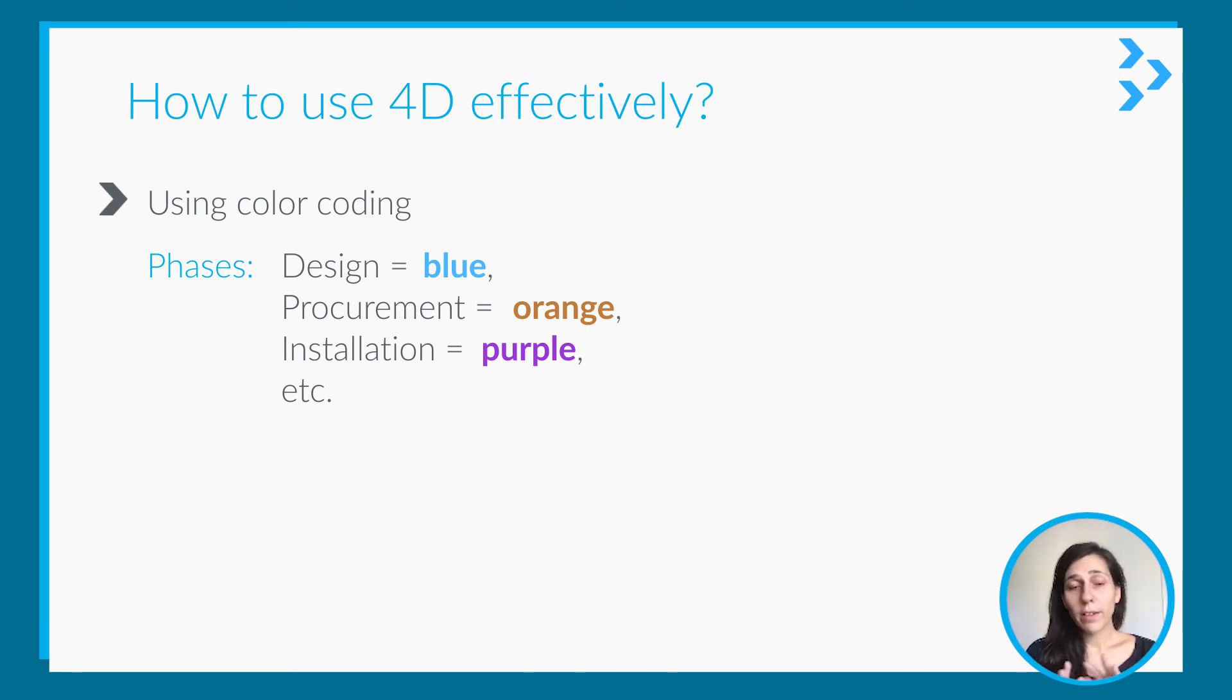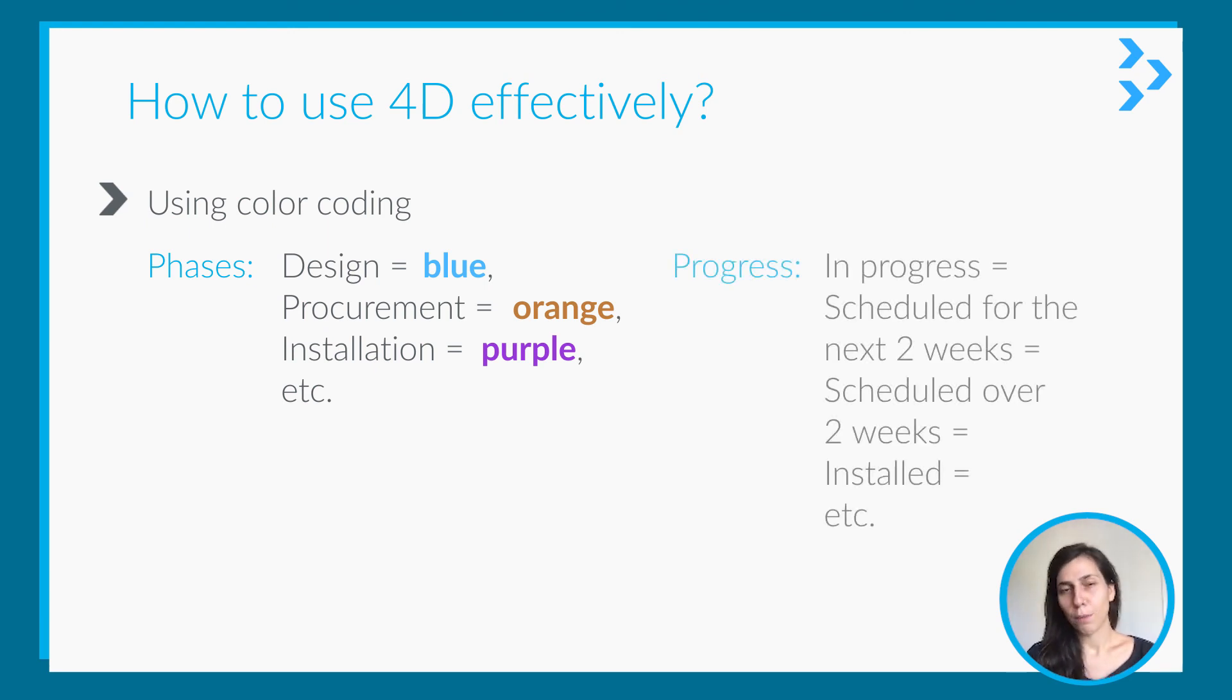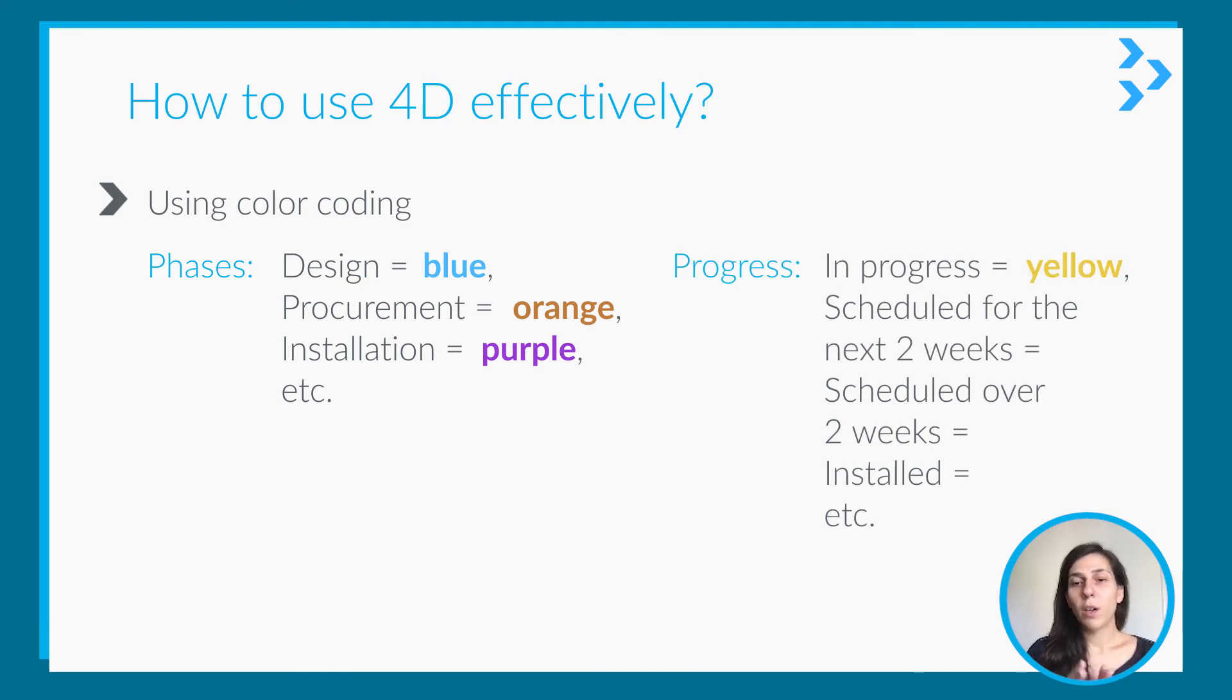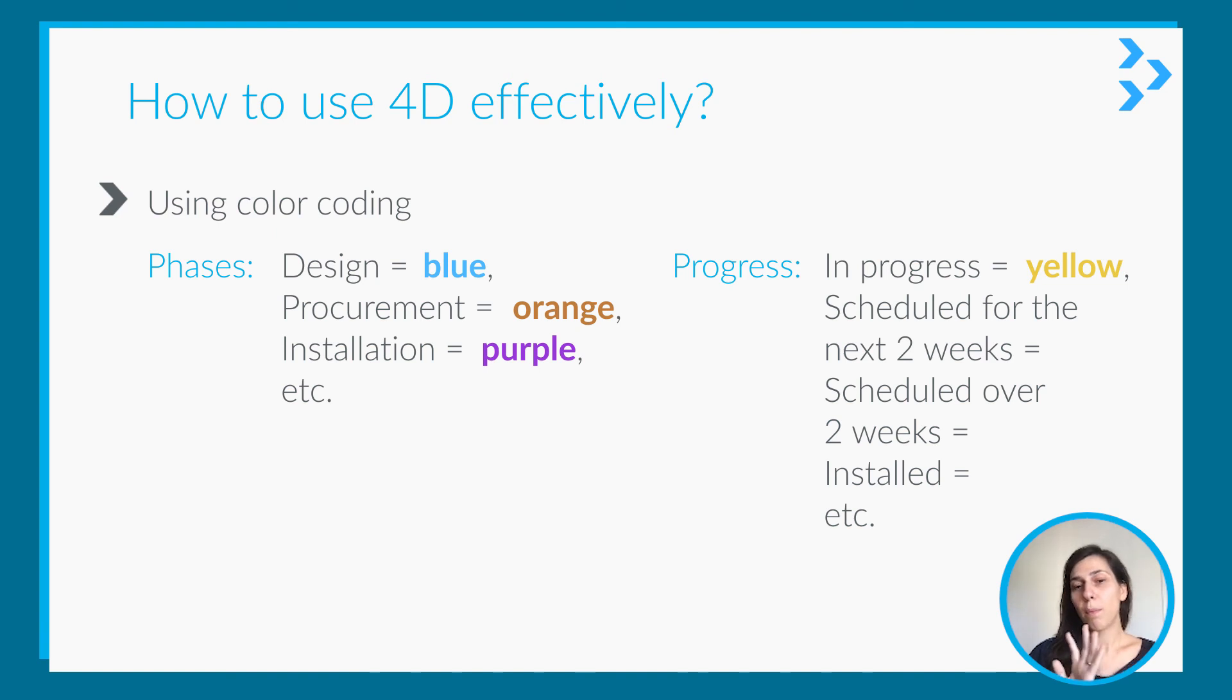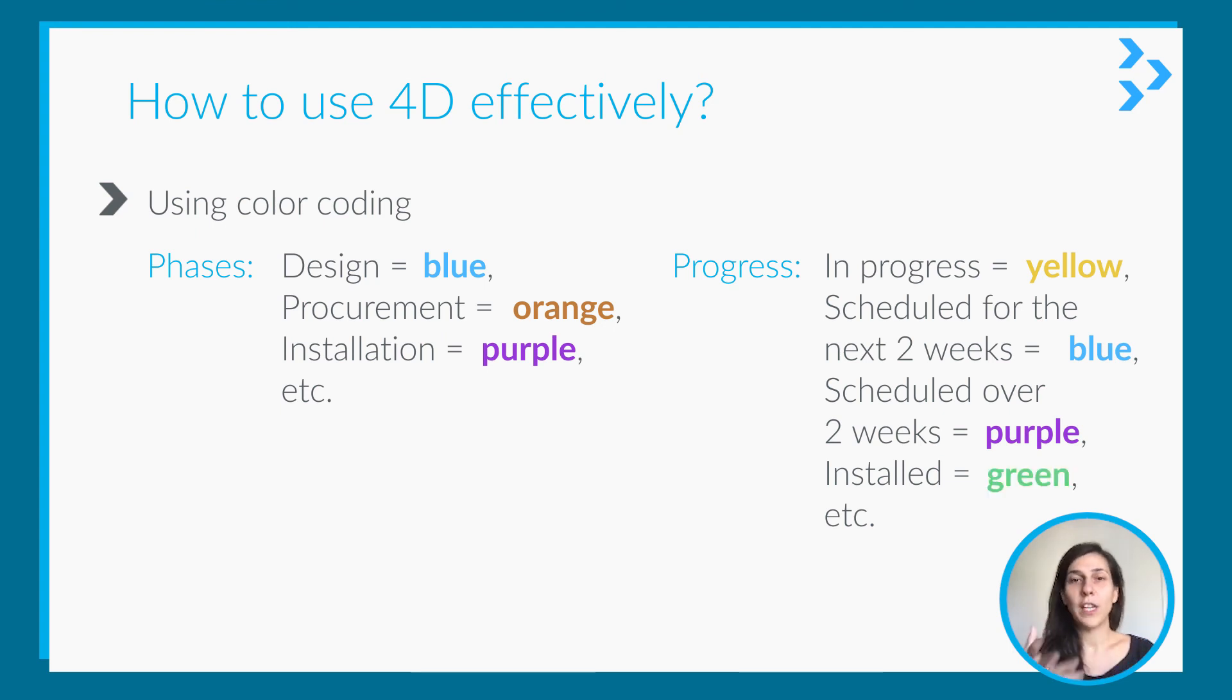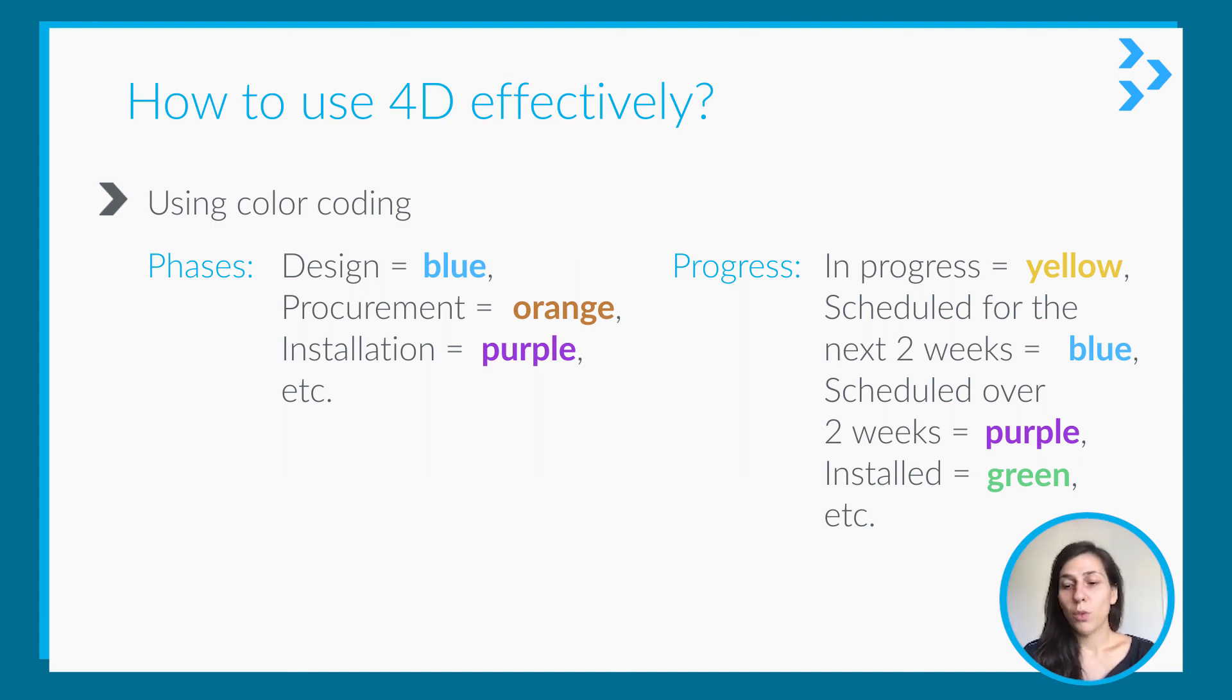Or you can choose a different option to show progress, for example. You can show in-progress activities in yellow, or scheduled for the next two weeks is blue, or scheduled over two weeks is purple. And once you install it, it's green, for example. So you can use different types of color coding.